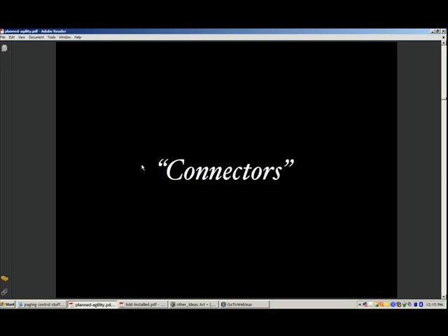Those are areas where we can do the story that's going to end up as a form with a drop-down first, if we're optimizing for business value, and then do the management thing later, and then connect the two. So just something to keep in mind. It's kind of an edge technique. If you can, I try to sequence things for utility at the beginning of a project rather than business value. Ultimately, you have to deliver X amount of business value, but pay attention to how the stories go into the system and try to keep them independent.